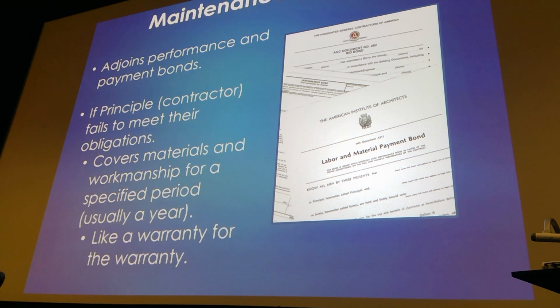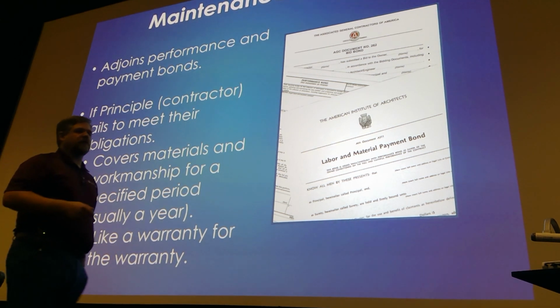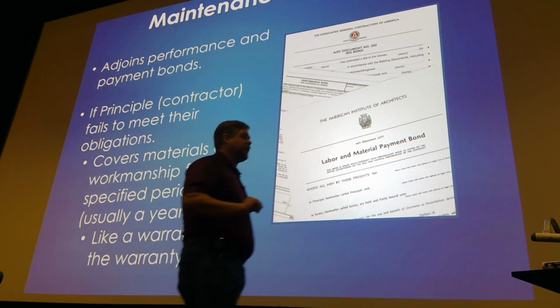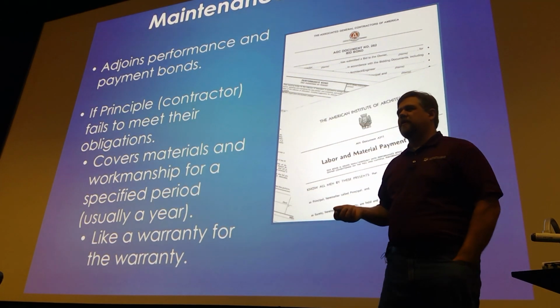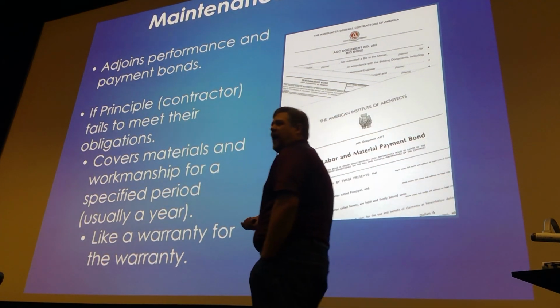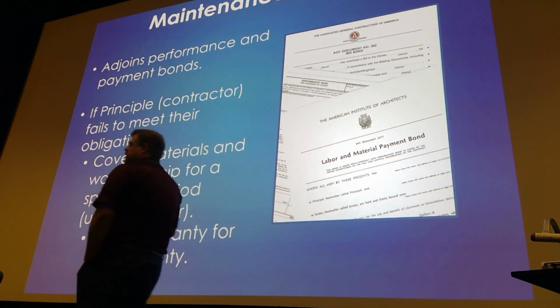Maintenance bond, I talked about this. I said it usually comes up with landscape, things that we have to maintain through our warranty period after certificate of occupancy.